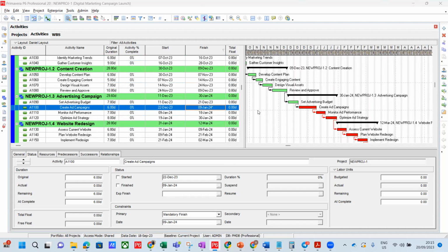I still need to go over that video, but I was able to understand what a constraint does. It shows that after this particular day, all activities have to finish on the set dates that you've allocated, because there's no longer float, or allowance for any delay or any push. Any delay that comes after will affect the whole essence of the project. So any float that we have stops at this point.